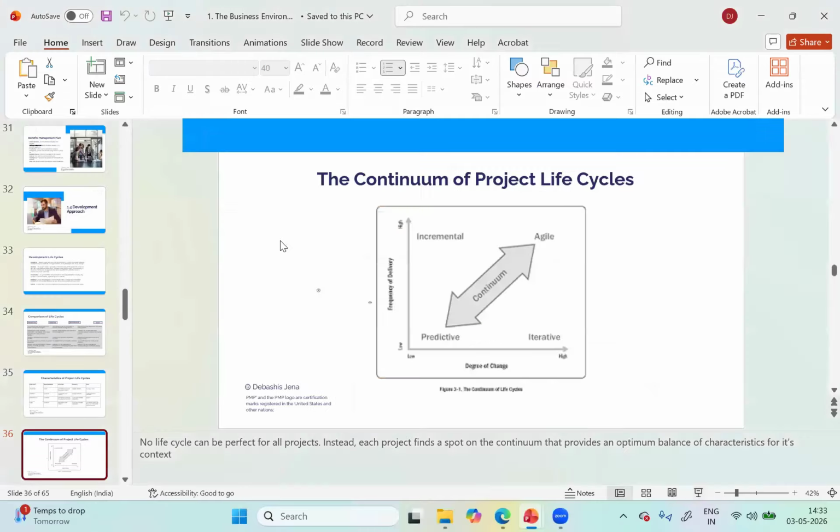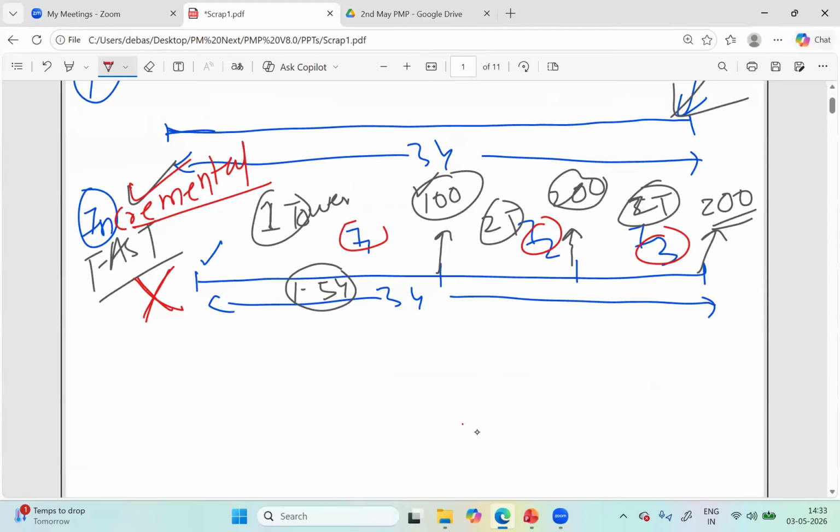For example, when I say least dynamic, come back to my residential complex. Now, end of iteration one, I build 100 apartments and give them to the users. Somebody says, hey, I didn't like the tiles on the floor. Do you think I'll dig that up and change the tiles? No way. I have already promised these guys the specification of the apartments I'm giving.